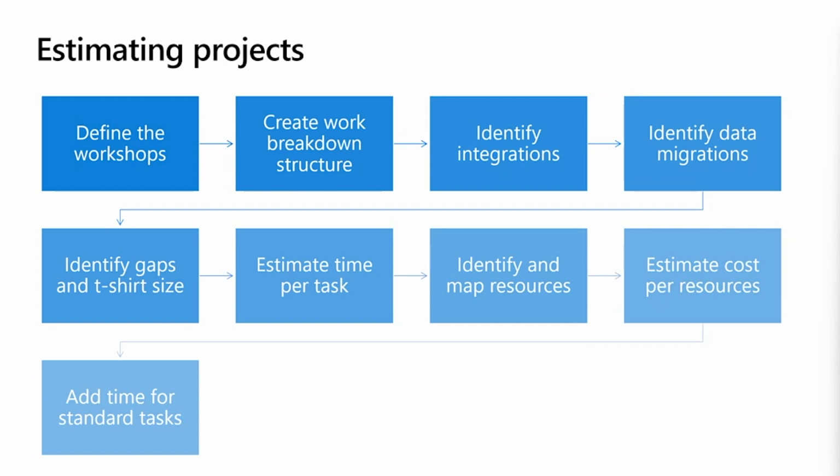You're also going to think about identifying gaps. Gaps could be any row that you had to add or modify in the spreadsheet because, if we had to add or modify or change it, it likely means that we have a gap right off the top. You're going to find gaps later on in your project too as you get more detailed requirements and go further on in your project. That's why it's an iterative process, especially with a large technology implementation.